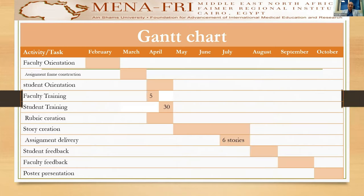This is the GANTT chart. After we obtained ethical approval from the faculty, we started in February with faculty orientation. In March, there was the assignment frame and construction, and student orientation in April. We trained five faculties in early April and 30 students in the second half of April. Rubric creation was at the end of April, and story creation ran through three months — May, June, and July — with six stories already delivered from the 30 students, who were grouped into six groups of five students each.